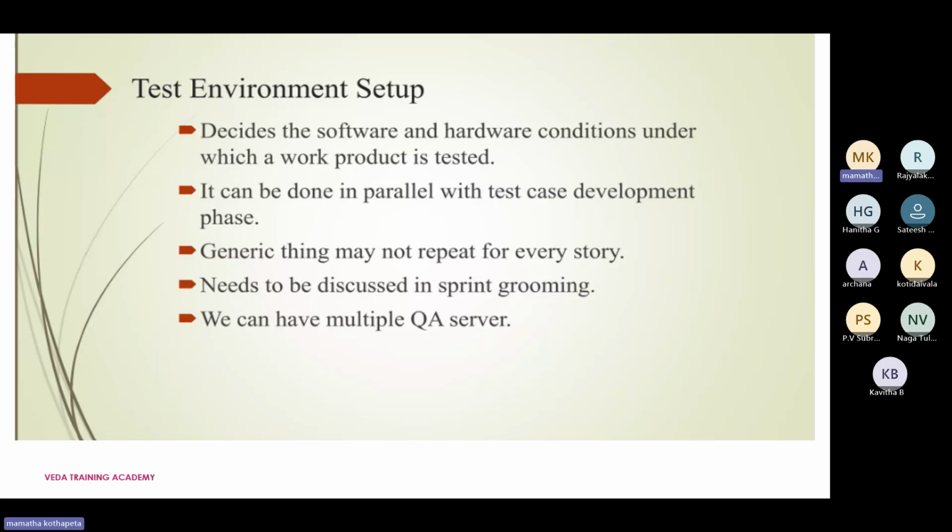Right? It can be done in parallel with the test case development phase. So whenever you're writing the test cases, the environment can also be set up parallelly. Because you will be writing the test cases, right? You will not be executing. Once your test cases are ready, then you'll start testing the application. In the same stage, we can also set up the environment. Generic thing may not repeat for every story.